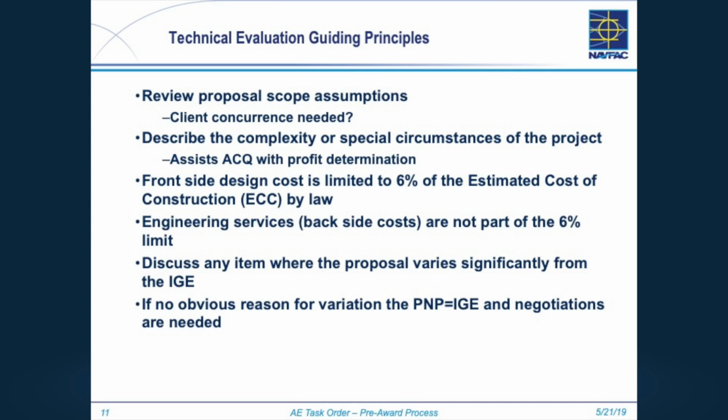Some of our clients, DLA comes to mind, have approved the statement of work to say, yes, this is what we want. If there are scope assumptions that come back that modify that, you may need to send them to them for their concurrence. That's not really applicable to in-house design support because we're the recipients of it and we can decide whether it meets our needs or not. But it could be a big deal. BUMED is a big one, DODEA is one, some of these special clients that have their own rules. You want to make sure that you're not going to get surprised later.